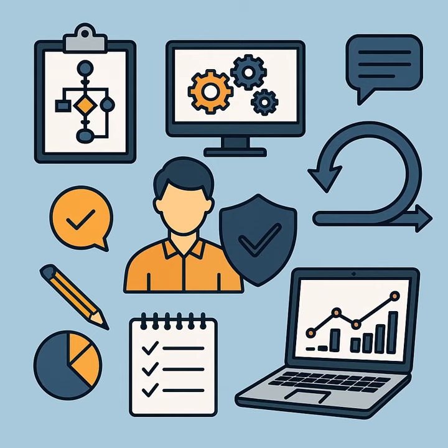Then we have the could have items. These are things that are nice to have, but you could do without them if you had to, maybe because of the budget or time constraints. Gotcha. What would be a could have for the kitchen? Maybe a dedicated wine fridge. Oh yeah, nice to have, but not essential. Exactly. And finally, won't have items are things that are definitely not happening in this phase of the project. Right. So that would be like the fancy smart faucet I mentioned earlier. Yeah, that's a good example.